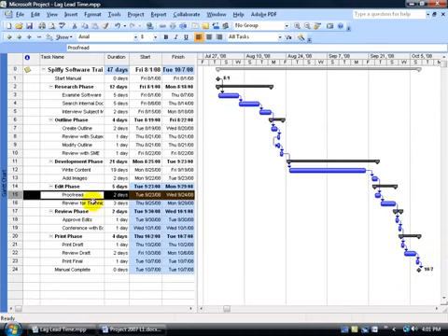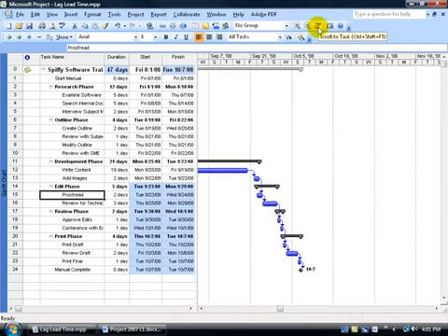In fact, let's try to zoom in on this here. I'm going to select it, come up here on the standard toolbar and click on Scroll to Task so it can be a little bit closer here. So I'm looking at the task here and that task here. It's supposedly starting a little bit earlier by 1 day. In fact, you can see it's cutting in or overlapping with that task above. It's not doing it right after. You can see the arrows going right at the end instead of going right before it. So it does have lead time.